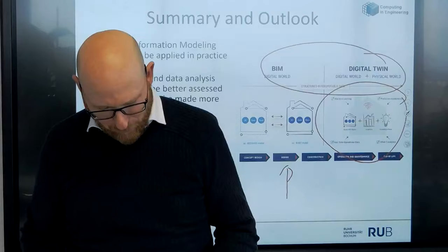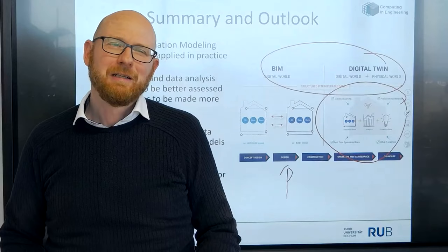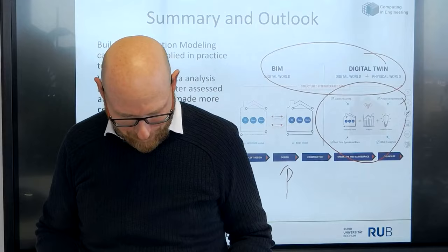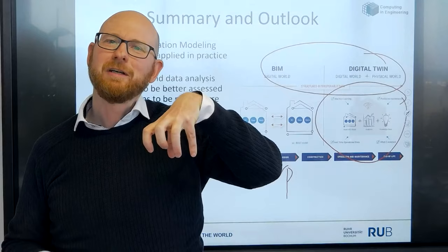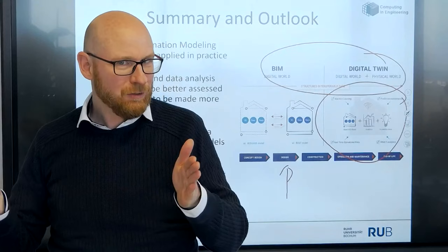Yeah, so you have to define the real use case. If you already have a BIM model and then do a LiDAR scan or use drones, we did some research on this. You do the planning of the flight and the collection of the data based on the BIM model. Then you say, okay, at this position I take some images, and I know the position of the scanner in the BIM model. Then you only do a comparison and you store only the results.